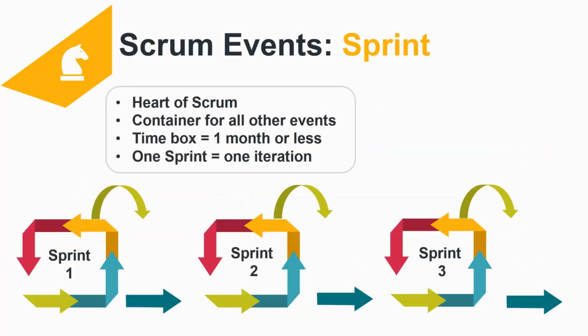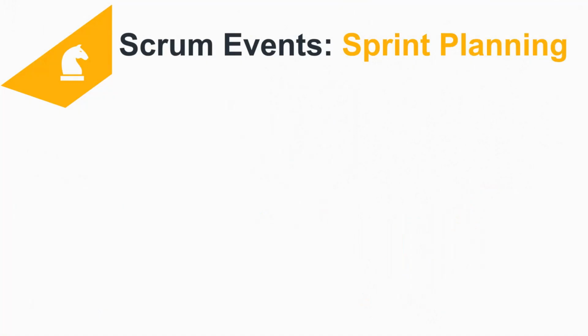With each sprint, you deliver something valuable for the product, project, or business. Scrum says that the sprint has to be no longer than 1 month. Usually it's 2-3 weeks, at least in the software development industry. By Scrum, the length of the sprint cannot be changed if it has already started, and the sprint itself can be cancelled only by the product owner, only in case they consider that what you planned for the sprint is not relevant anymore.